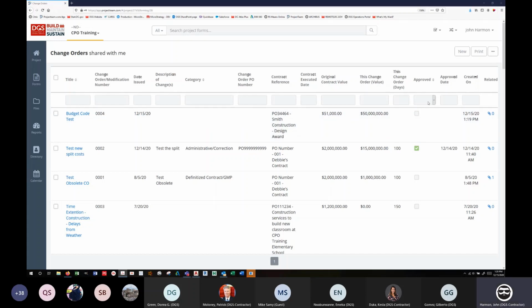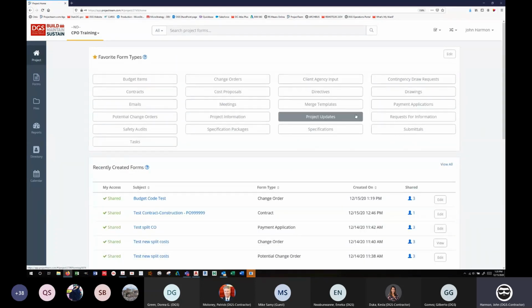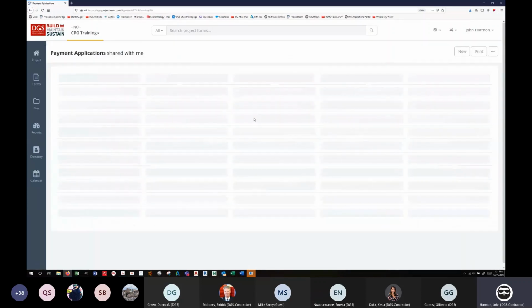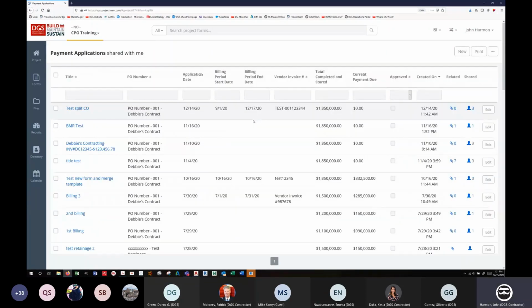Payment application, pencil copy versus invoice. Again, this is the pencil copy. Your payment application is the pencil copy. It is not the invoice. They have different requirements. They are different things. They are different records. So when you are dealing with the payment application prior to the invoice submission, you are just dealing with the pencil copy.